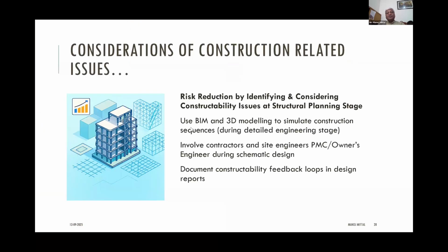We can also consider using BIM and 3D modeling, the advanced technologies, to simulate construction sequences and see where clashes are happening. We also need to involve the contractors, the site engineer, and the PMC or owner's engineers during schematic design itself. We should not think that we are the experts and whatever we design should be constructed. Whatever we design should also be implementable and construction friendly. So we should take care of the views of the contractors and site engineers and consider all those issues in our design stage.